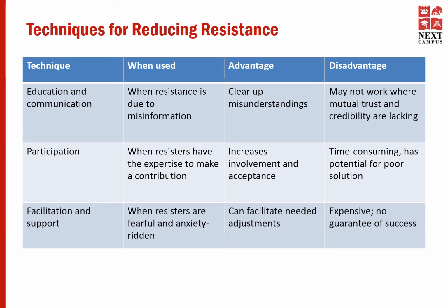The second technique that you may use is participation. You can use this when resistors have the expertise to make a contribution. You make them part of the change. The advantage of this particular technique is that it increases involvement and acceptance. However, the disadvantage is that it is time consuming and has potential for a poor solution.